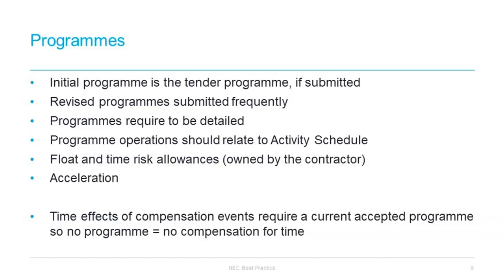Clause 60.15, if the employer and others, such as the employer's team, are to work within the time shown on the accepted program, and there's a compensation event if they don't. So again, an out-of-date program may justify information being supplied late by the employer's team if the program doesn't say when it needs to be done by, if they, for example, were not aware of changed deadlines.